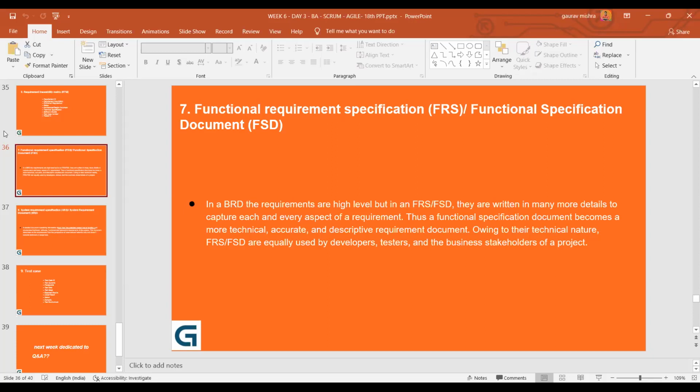Okay. Are we involving the customer for the review or not? Honestly, in the documents, many times customers are not asked to review it. See, they can review it from the understanding point of view, right? But then in the approval matrix, we just take a final approval from them that it is accepted and agreed by the customer. Okay, so that means it's approved by both the parties.